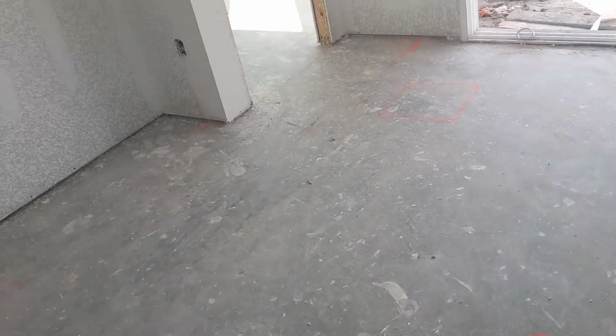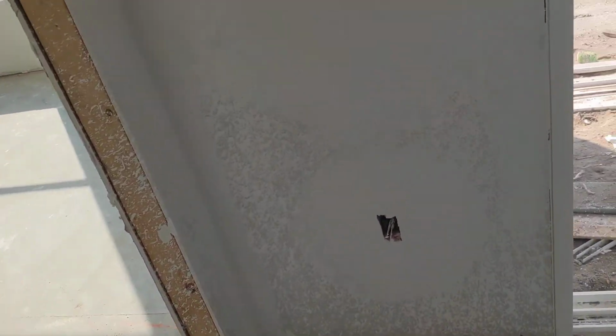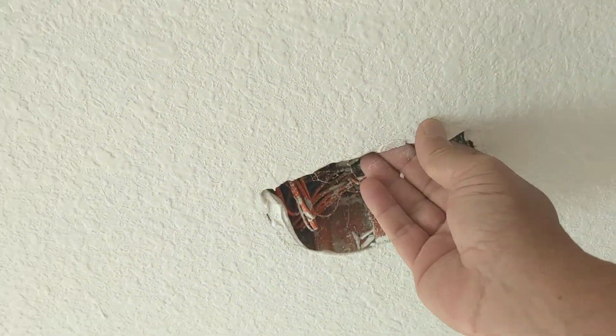Then right after the electrician, or sometimes it's the low volt that's the very last, it doesn't matter. Then I call for what we call a rough clean. Now right now it's roughly clean, but when the electrician comes, for example, any mud that's in the way, he's just gonna do this to it, right on the floors. And usually find there's gummed up mud in the outlets. That's just common everyday stuff. So that'll all be cleaned up, and it falls on the floor and gets dirty with all that mud.